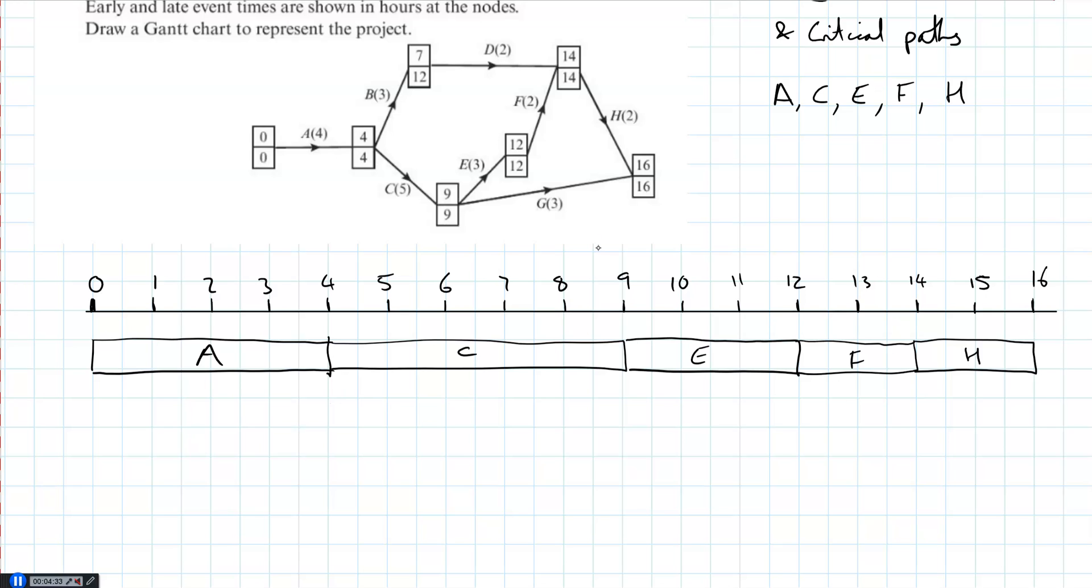On our Gantt chart, we then need to include every single activity, and every single activity that is not a critical activity gets its own row, and starts - we normally do this, you have to read the question carefully - but normally you start at the earliest start time. Sometimes it'll say so it finishes as late as possible, but most of the time it's as early as possible. So let's look at our first non-critical activity, which is B.